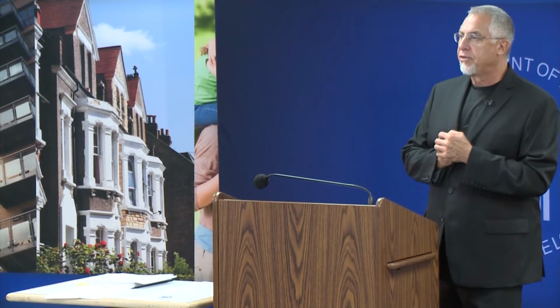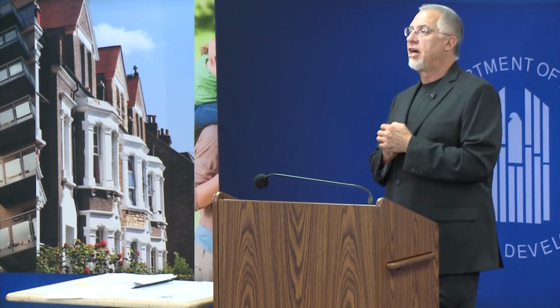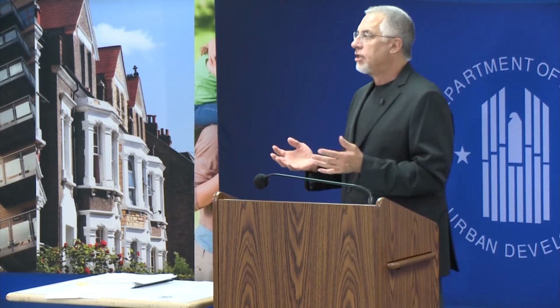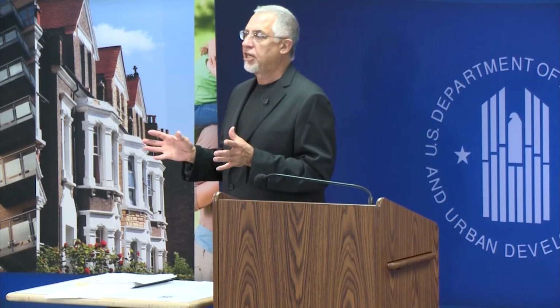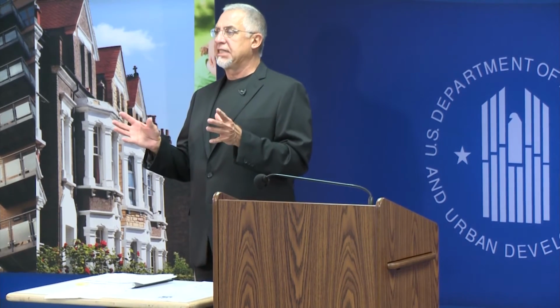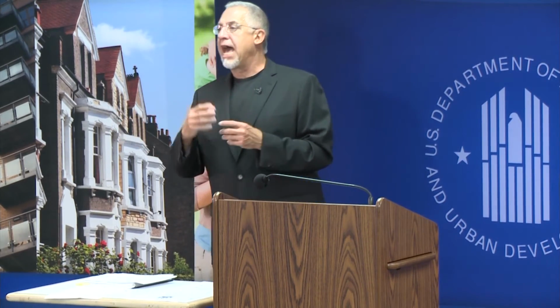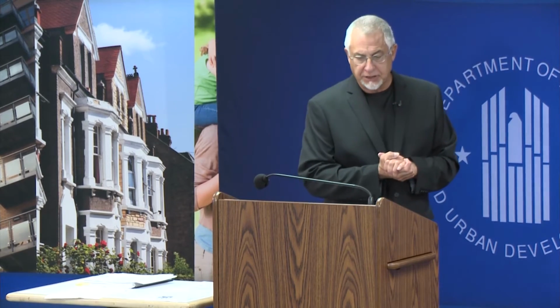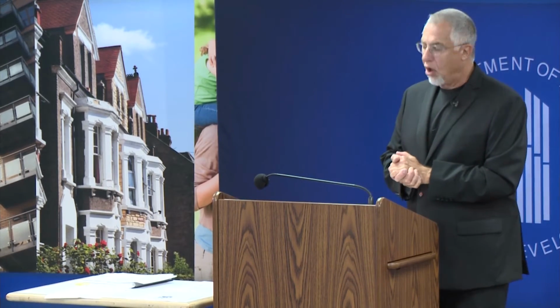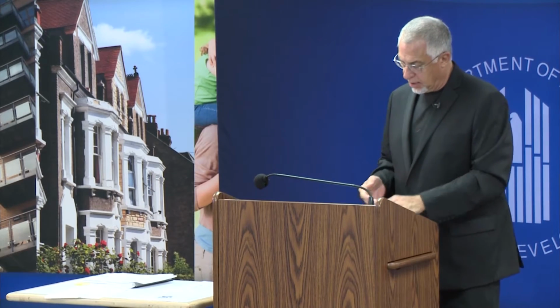The threshold for doing a cost or price analysis is $150,000. So once they estimated the cost was going to be $160,000, that would have required them to do a cost or price analysis.